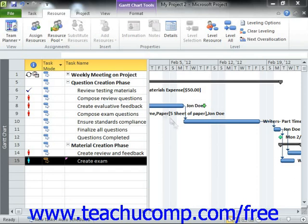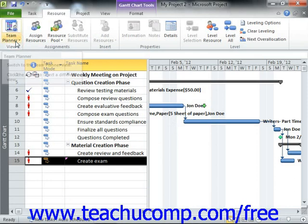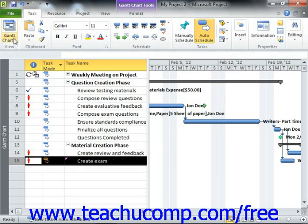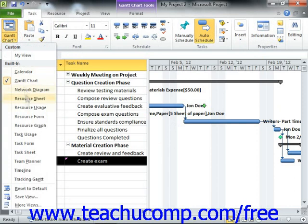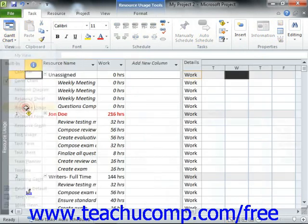One useful view that allows you to see resource allocations is the Resource Usage view of your project file. You can click the Gantt Chart dropdown button that appears in the View group on the Task tab within the ribbon, and then select Resource Usage to see this view.